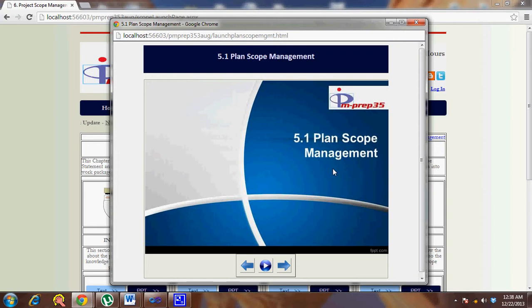The scope management plan is understandably very specific to the scope as such, and when you talk about the requirement management plan, you're talking about detailing the requirements. For example, how you would build the requirement traceability matrix, which will trace the requirements across different project phases.